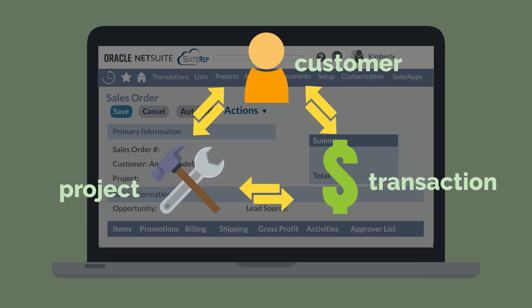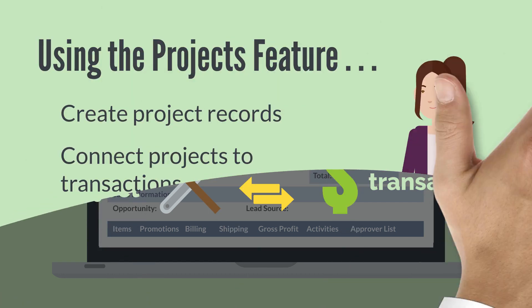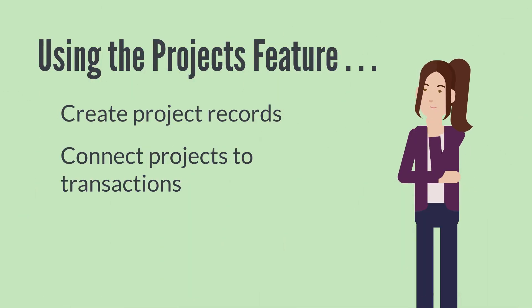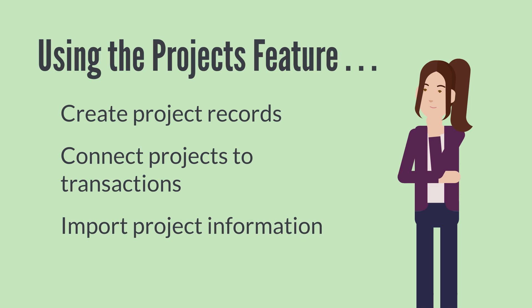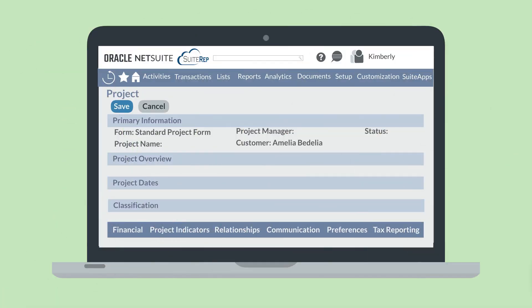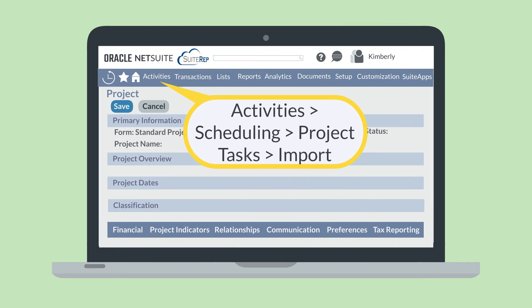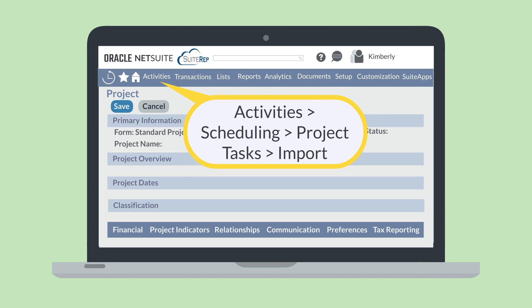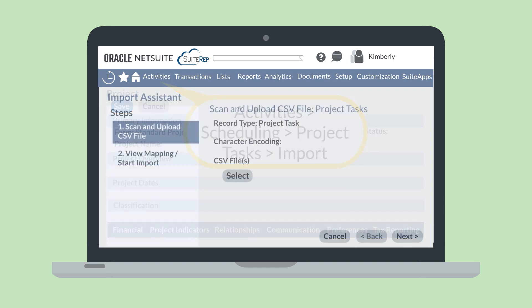Perhaps you keep track of key project information outside of NetSuite, but you still need to have the information tracked in NetSuite as well. You can bring that project information into NetSuite using a CSV import. Running a CSV import for projects, however, looks a bit different than a regular CSV import. Rather than accessing the CSV import assistant through the setup tab, you need to navigate to activities, scheduling, project tasks, import. Doing this will take you to a modified import assistant page. All you need to do to import your project information into NetSuite is to follow the instructions.